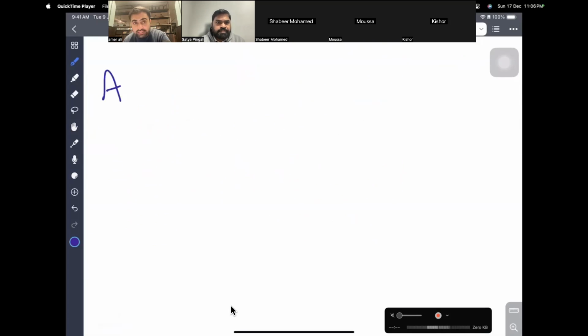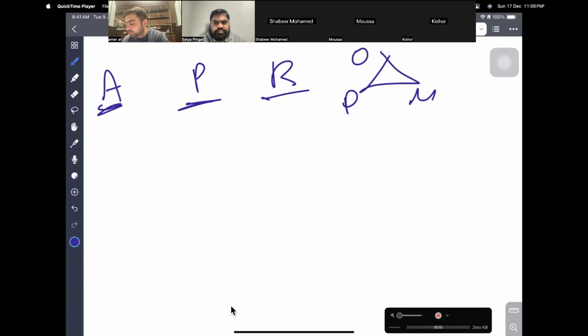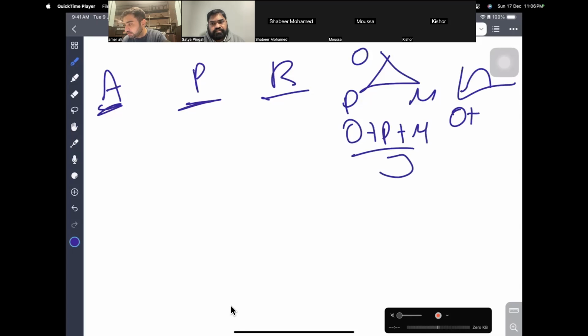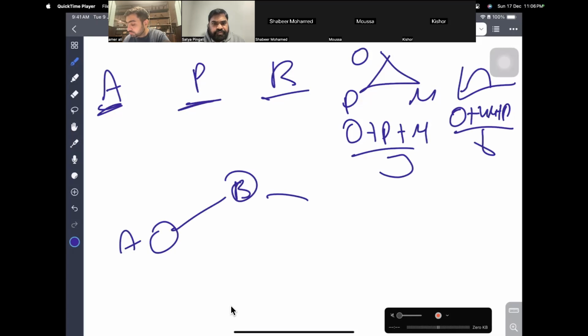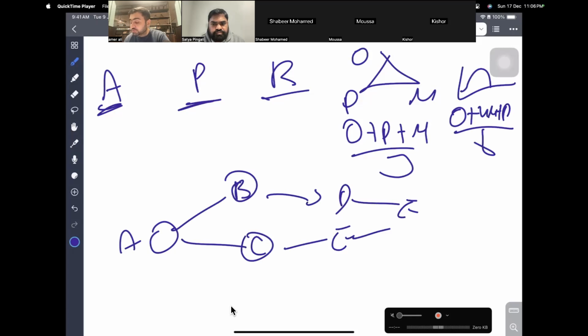using analogous estimation, parameter, bottom up, and 3-point estimation, which can be optimistic, pessimistic, most likely, average, or beta estimation. We will do that. Once we have all these things for activities, we will use critical path method to calculate the duration of each of them. And once we have the duration, we will just add them simply, that will become schedule baseline.